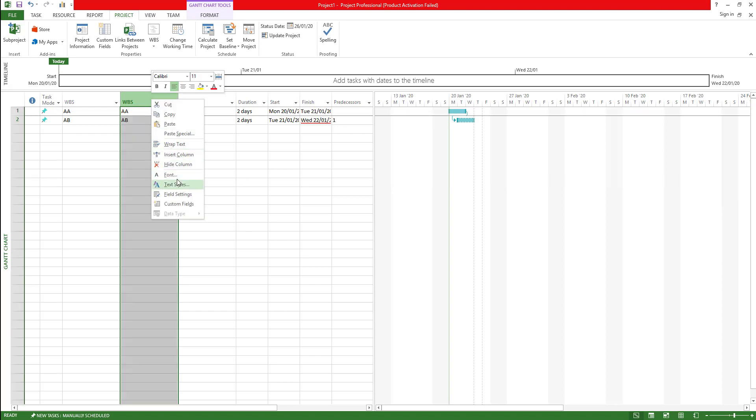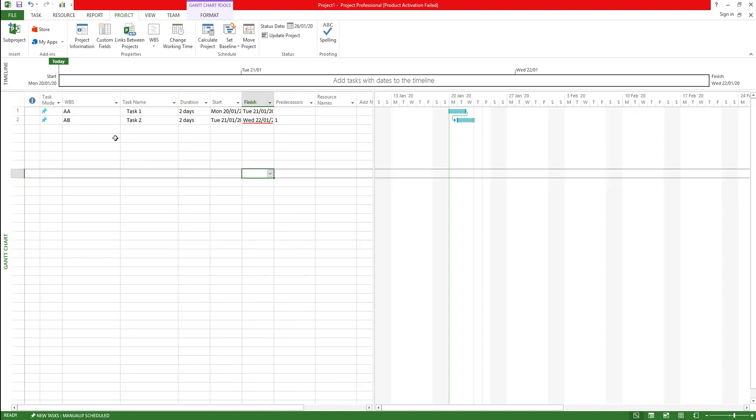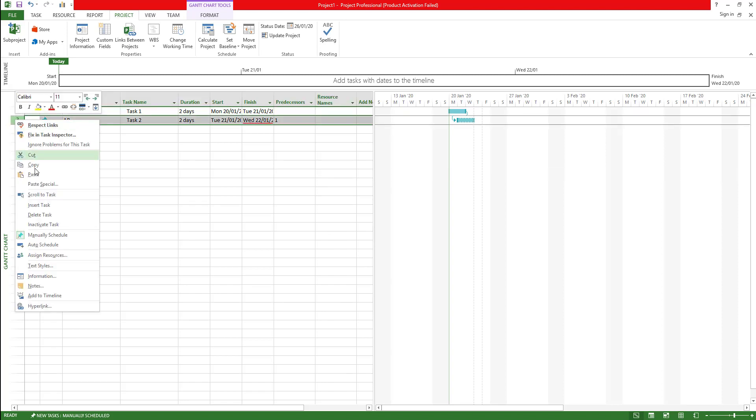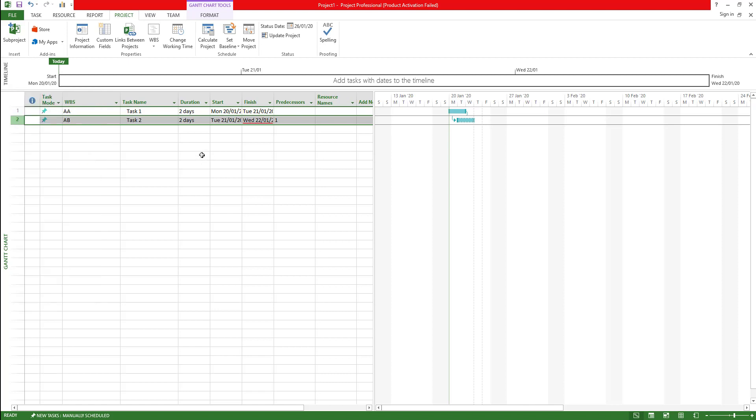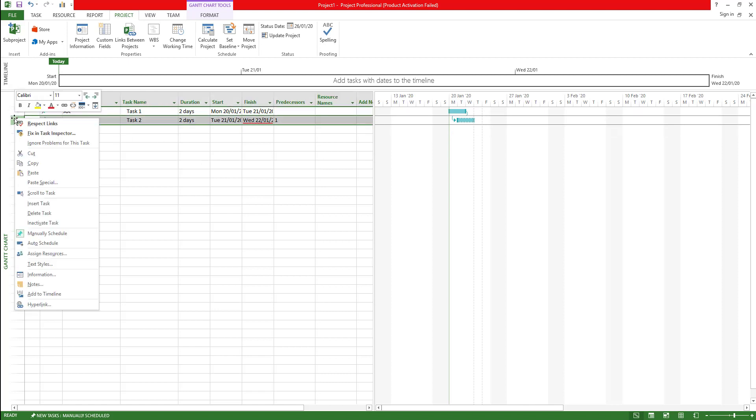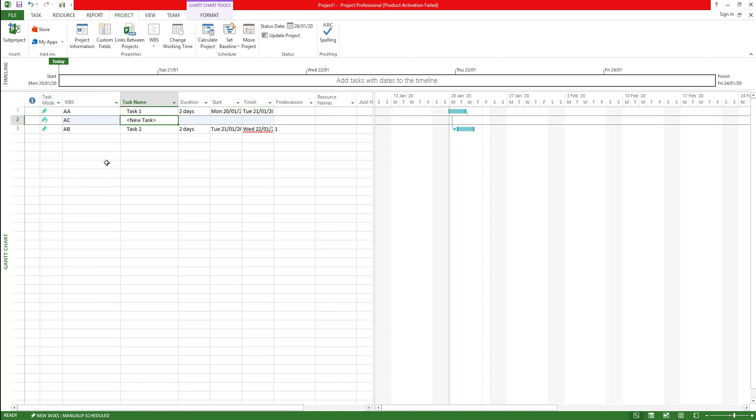We have inserted the WBS code. Now let's say if I actually have another task which is created, I'm going to say insert another task. You can see it automatically creates a code based on the structure we have defined.